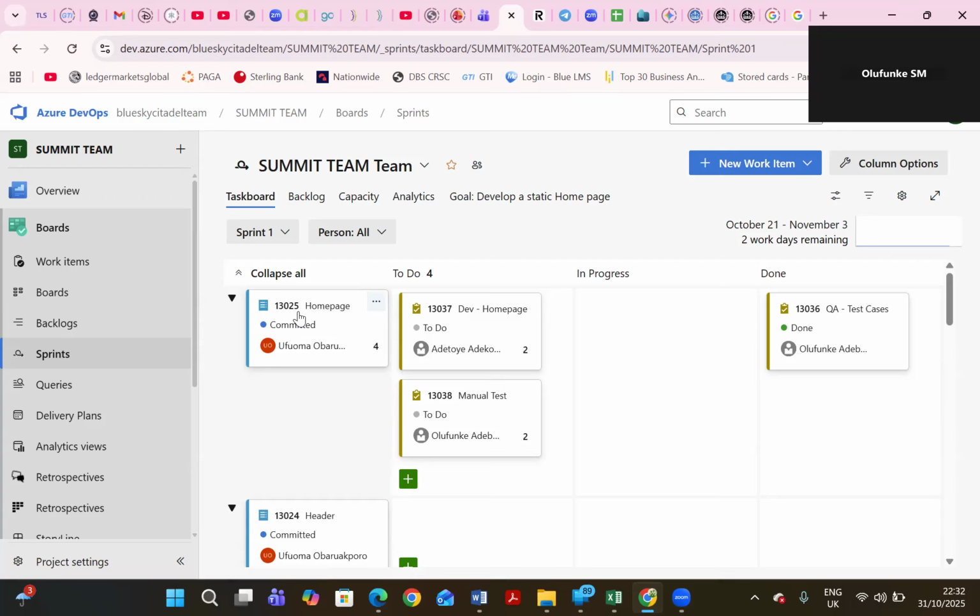efforts. The one we've just created now, which is the task that has the yellow stripe on the side, is individual voting. It's not even voting now, it's individual estimation. The one for the story is a collaborative voting to get the effort.